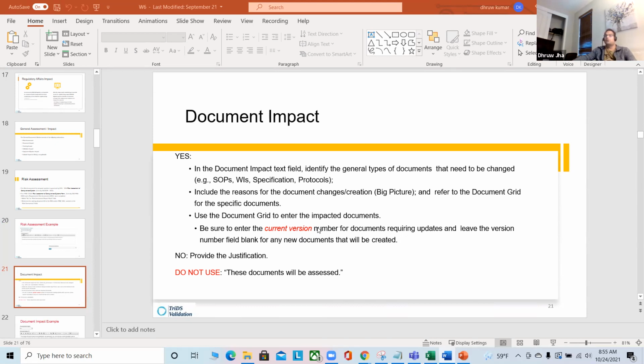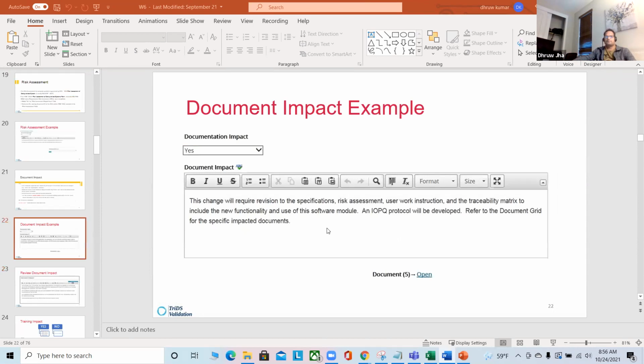You have to add the new requirements, route it for review, route it for approval, and then in the system it goes from 10 to 11. So now your 11 is the effective document. 10 is superseded. 10 is the old one, 11 is the new one. So you have to make sure that you use the most current revision of the system. And that's how it works.